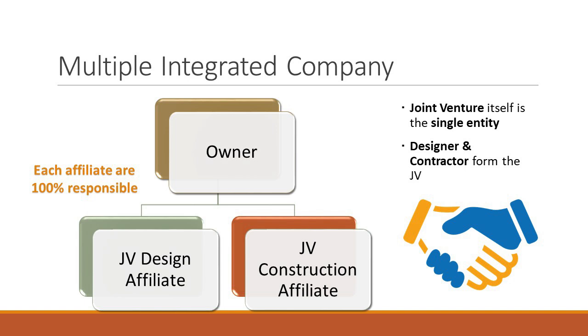So that's the biggest takeaway of this joint venture multi-integrated company: each affiliate of this design-build entity is 100% responsible for the other affiliate, and the owner can elect, if there's a problem, to go after one or the other, or both. Make sense? Okay.